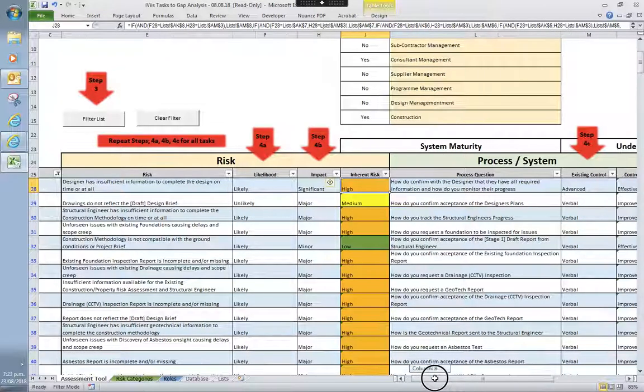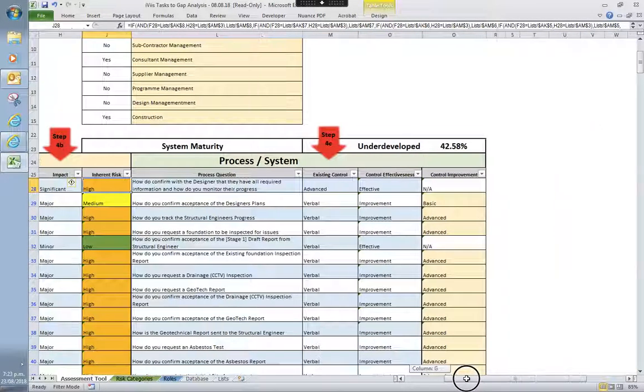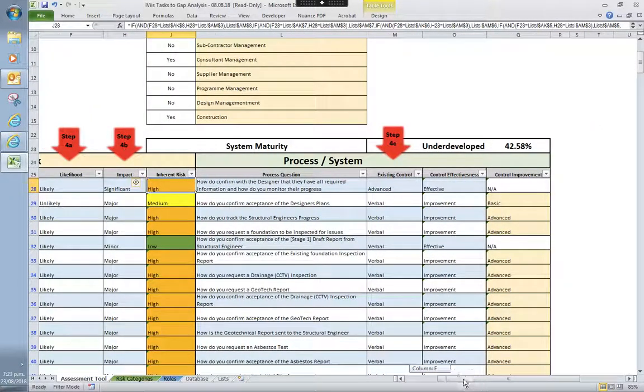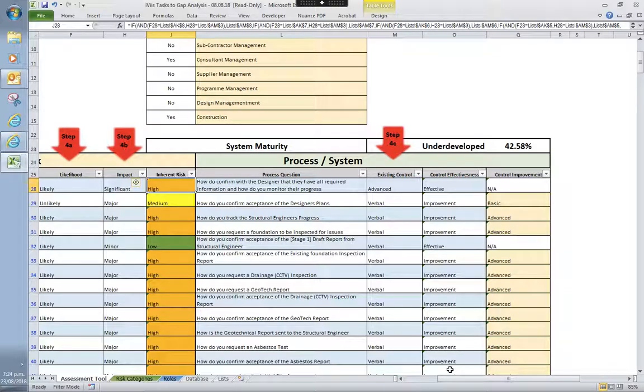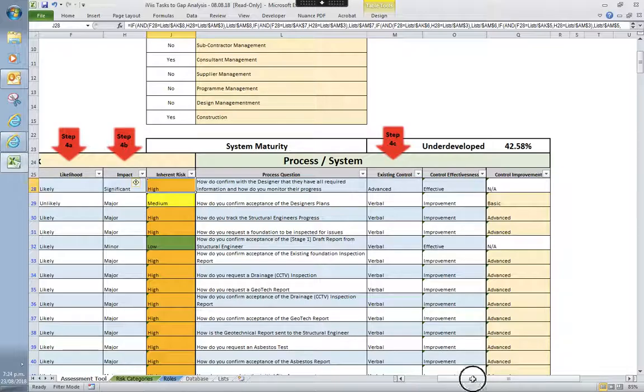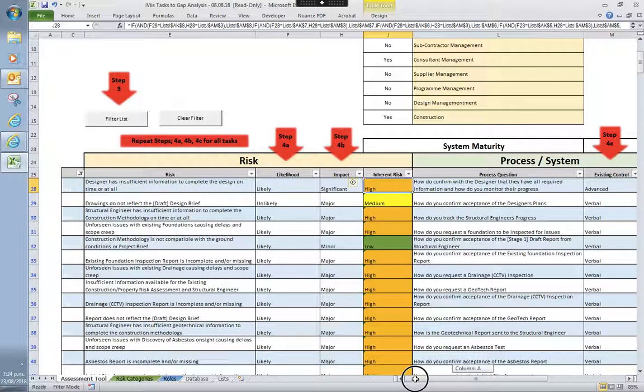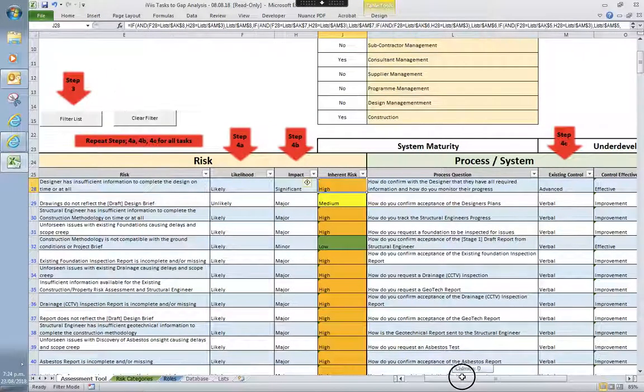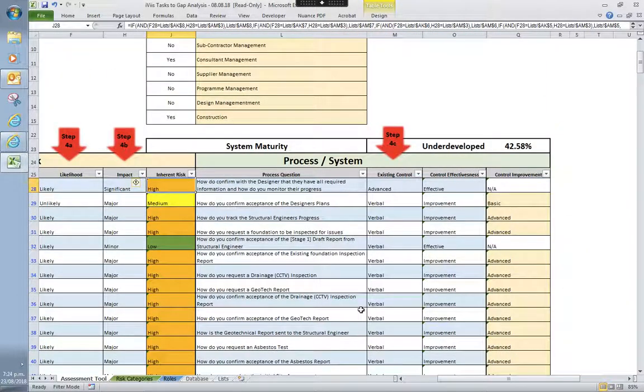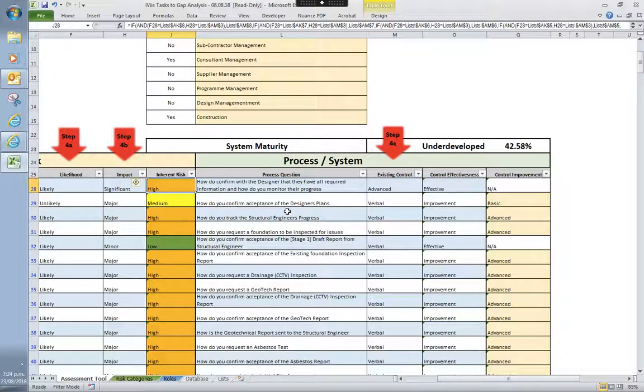So moving on to the second part, you look at the system or the process in place to manage each of those individual tasks. So you have to ask yourself, the previous one, jump back there, the designer having insufficient information, you would look at how do you confirm with the designer that you have the required information and how do you monitor their progress?